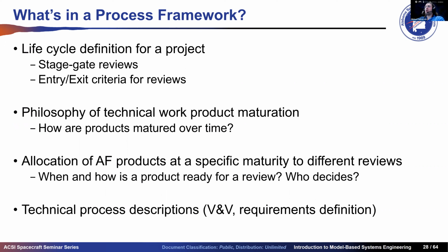Number one, that life cycle. You have to know what reviews you're going to be preparing for, what review data packages you need to make, what is going to be the integrated master plan, the schedule for your system. And that integrated master plan is in fact a product that exists in the mission architecture framework. So how are we going to mature each of these products over time? That is a big deal.